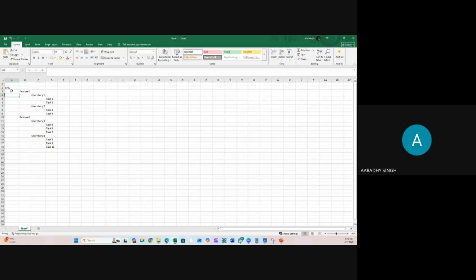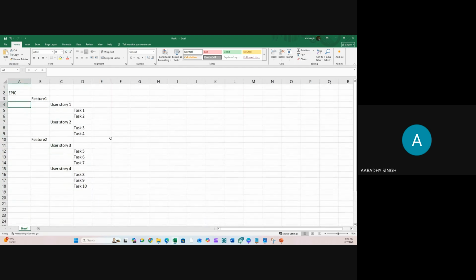For example, suppose you're going to develop an ERP. The total duration of the ERP development is 3 years. So what you can do is create it module-wise. Suppose in your ERP you're going to develop a total of 5 or 6 modules, or maybe 10 modules. For every module, you can create one epic. Any questions so far? So what should be the duration of the epic?